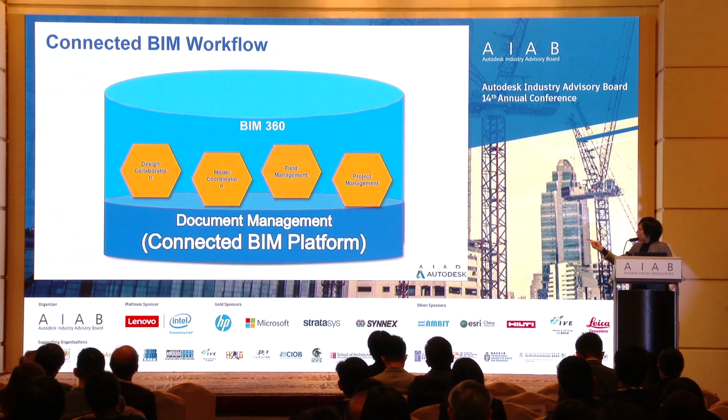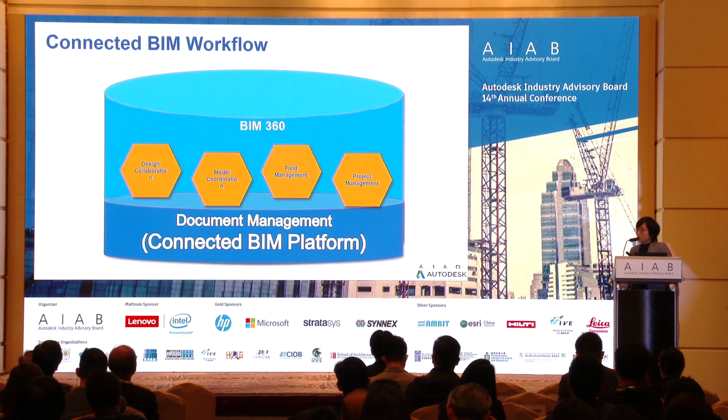And then there is field management and project management, which is in the later stage of your construction projects, which means your BIM model is ready for construction. You may have safety issue checklists, quality commissioning checklists, and also submittals and RFI, request for information, workflows. You can do it all in our field management and project management module.